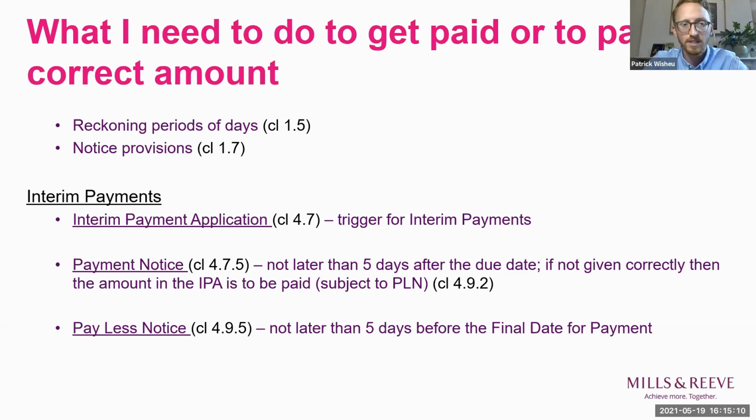And in it, the employer states what it considers to be due, not as at the due date, but as at the date of that notice, the amount due to be paid. So that can take into account anything that's happened since, or in particular, it can take into account liquidated damages that may have continued to accrue.